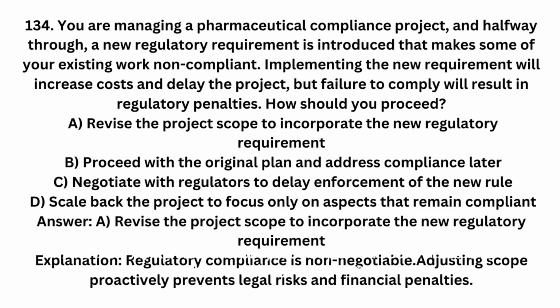Answer. A. Revise the project scope to incorporate the new regulatory requirement. Explanation. Regulatory compliance is non-negotiable. Adjusting scope proactively prevents legal risks and financial penalties.